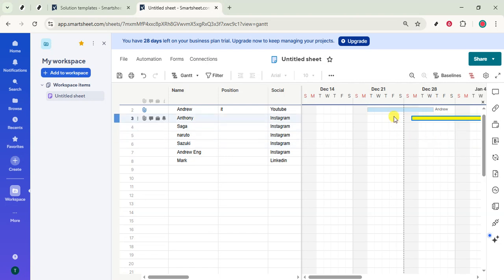If your team follows a specific scheme, for example, blue for planning, green for go live, or red for critical dates, match it here so everyone gets the same visual cues at a glance. After you choose the color, the milestone updates immediately on the chart. If it doesn't change right away, click once on an empty area to refresh the view.